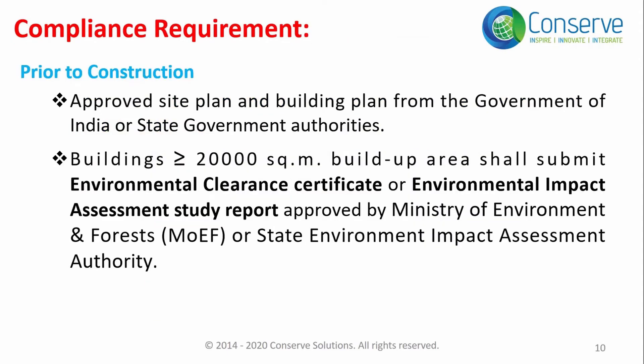The compliance requirements can be broadly classified into compliance prior to construction and compliance prior to occupancy. Prior to construction, the project should have an approved site plan and building plan. The approval shall be from the state government or central government authority as applicable to the project location and size.